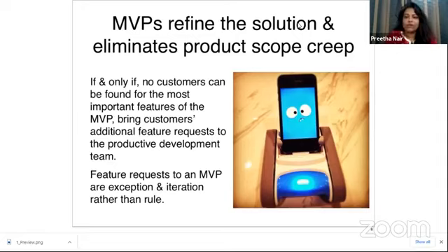The downside of product scope creep is that it increases the product life cycle, delivery life cycles get impacted, and to a certain extent quality gets impacted, because there becomes a need for regression testing, as every addition of a requirement may impact a couple of other features or workflows as well.